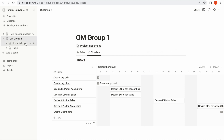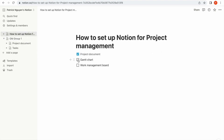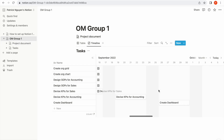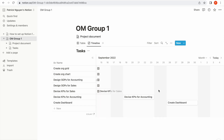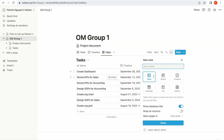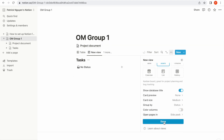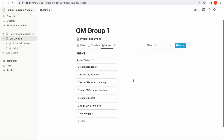The third item is an extra I would like to share with you. Besides the Gantt chart, you would like to have a platform where you can manage the work in detail and collaborate with each other. To do that, click on the plus button and this time choose 'Board', then click done. What the board does is group your tasks based on status. Typically there are three statuses: to-do, doing, and done. Right now my tasks have no status, so they are grouped under a column called 'No status'.